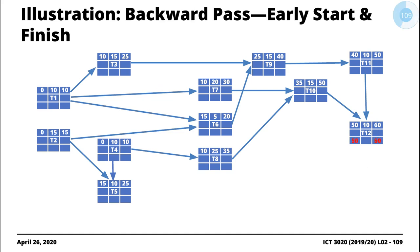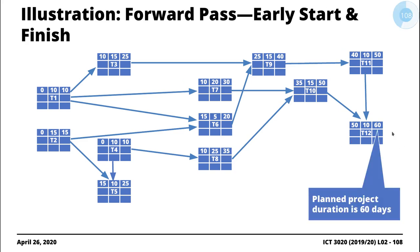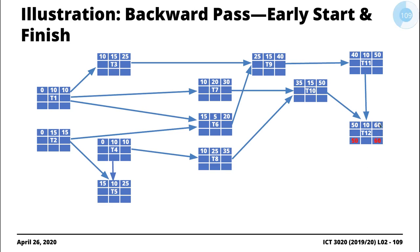For the backward pass, we do the opposite — we start with the last task. For the last task T12, the late finish equals the early finish, which is 60. We subtract the duration to get the late start: 60 minus 10 gives 50. Working backwards, T11 pulls the late start of T12 as its late finish, which is 50; subtract 10 to get late start of 40.